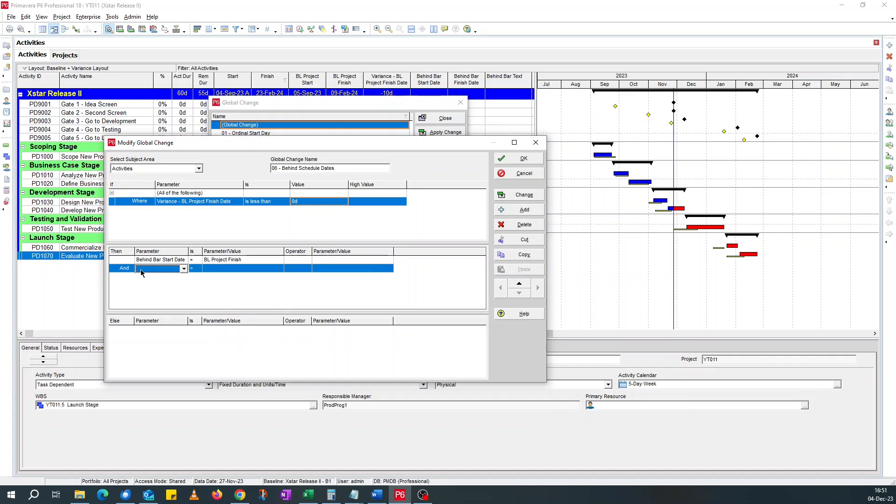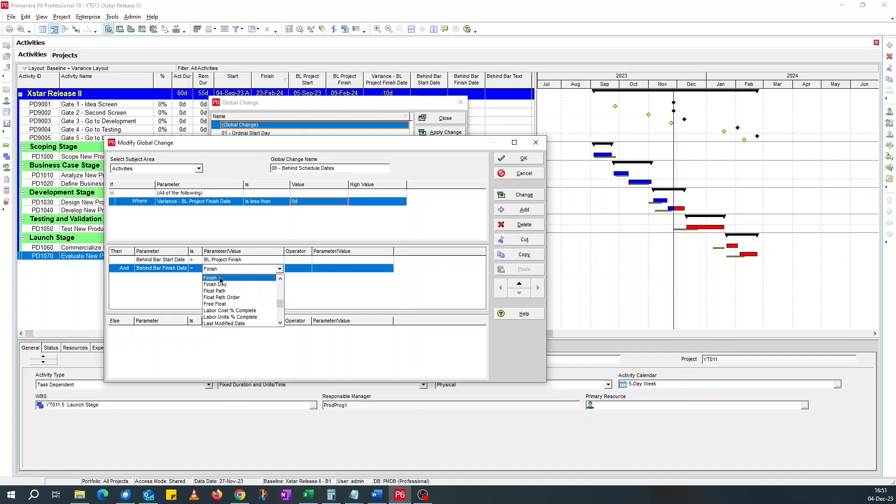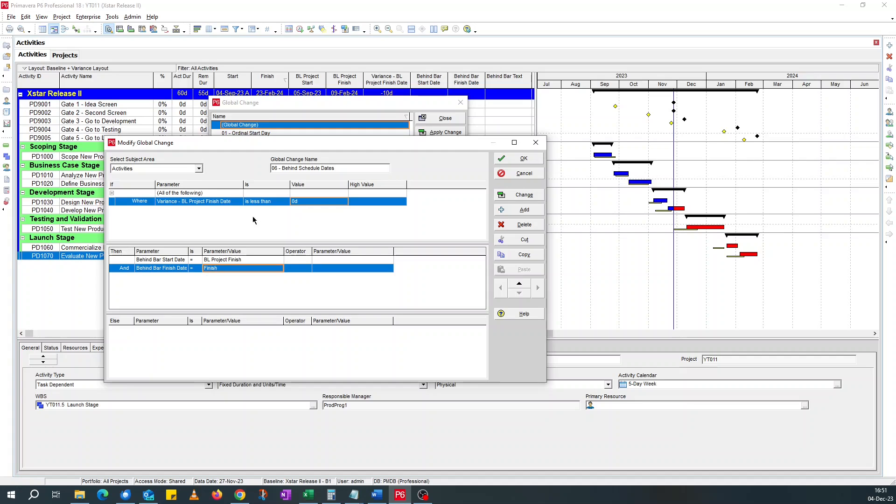And for the behind bar finish date, should be the finish date, the actual finish or the current forecast finish date of an activity. If it's activities completed, it will present actual finish. If it's not completed, it will present the forecast finish date.